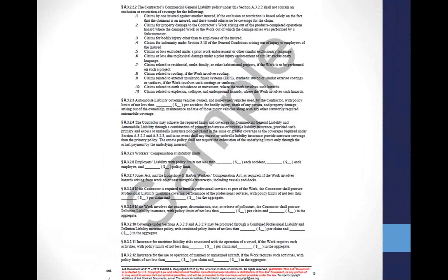That's a great point, because a lot of times on the general liability, people assume, well, that's general liability, it covers me for just about anything we can do. Well, really, that outline that he was pointing to there is defining essentially what it covers you for. And so, if there's a pollution exposure, to Kevin's point, on a project, general liability is not going to help you. Well, that's one of the itemized coverages that they're at least bringing to the table, like the cyber and some of these other things, where you can buy those extensions and cover that if the project requires it. Not every project's going to have a need for it, but more and more, particularly that cyber piece with the technology exchange that's going on on sophisticated projects, that's more and more important.